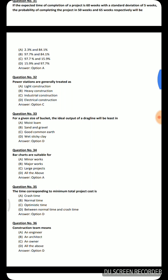Next question: The time corresponding to minimum total project cost is — crash time, normal time, optimistic time, or the time between normal time and crash time. The correct answer is the time between normal time and the crash time.